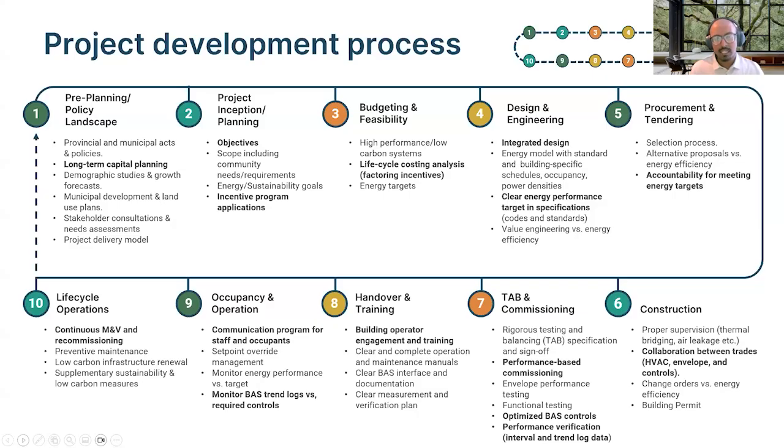get these stages right, because it's going to carry you over to a much longer timeline than the construction itself: the building's operations. The building life cycle or the system and equipment life cycle is going to outlast how long it took you to build it, or how long the construction took, how long the procurement took. And those could have a much longer lasting impact if you don't do the commissioning and TAB stages as comprehensively as is ideal.